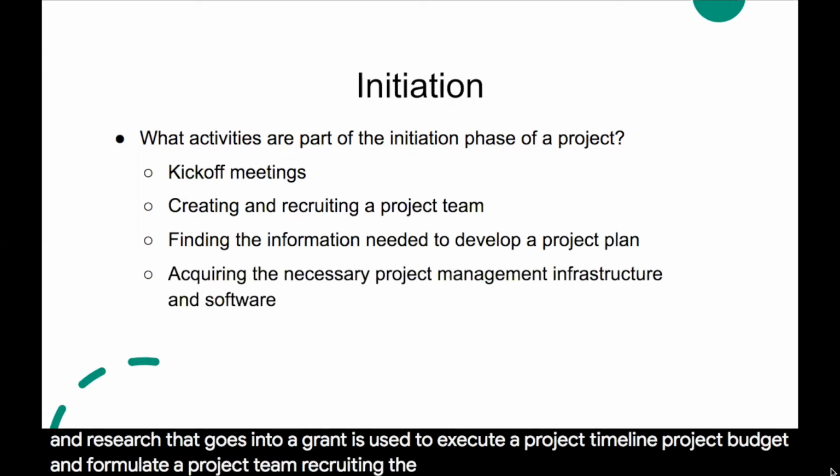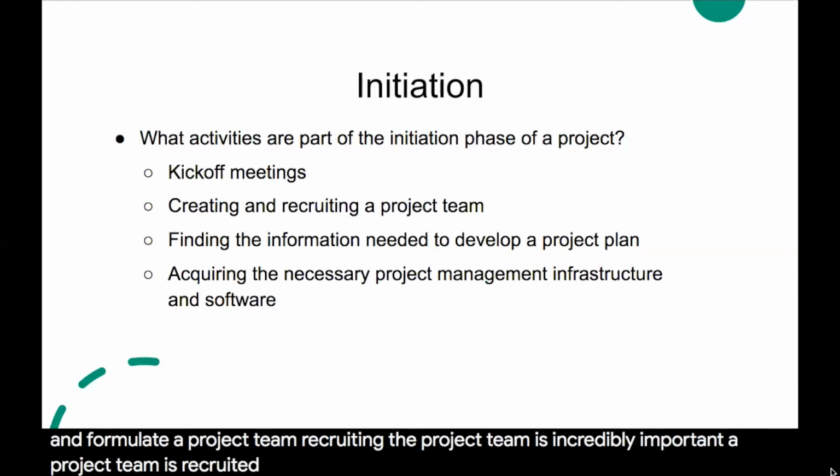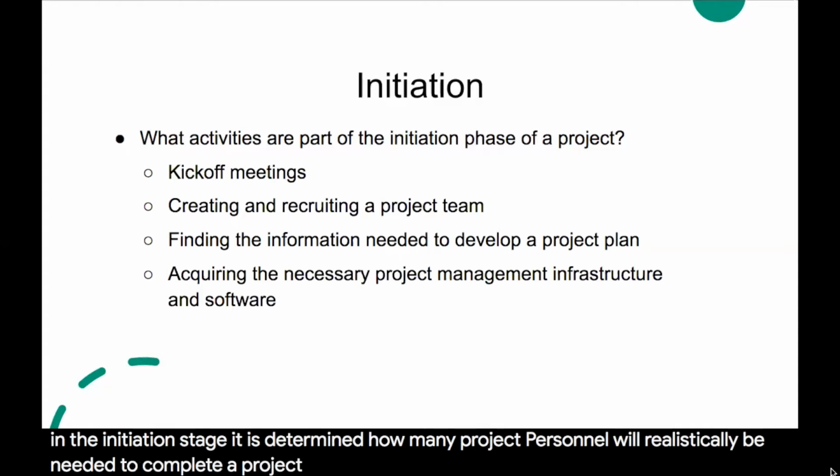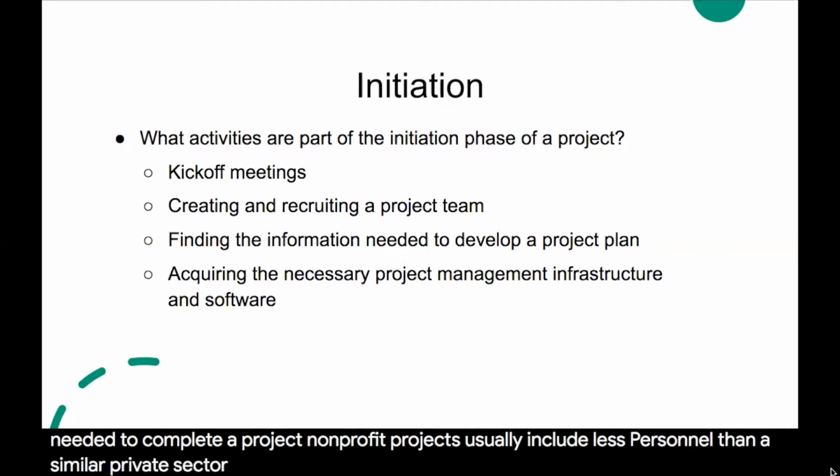Recruiting the project team is incredibly important. A project team is recruited early because personnel can make or break a project. During the initiation stage, it is determined how many project personnel will realistically be needed to complete a project. Nonprofit projects usually include less personnel than a similar private sector project, so it is extra important to select the right individuals.